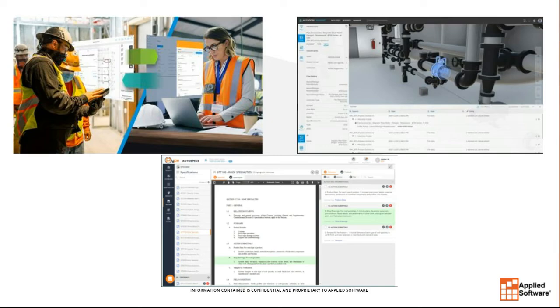And then at handover, a lot of times you get a big flash drive, or it used to be CDs. I mean, even when I was in the field, it was literally binders of paper that got stored in the security room in the basement. And until something broke, no one even knew where they were. And now what this allows us to do in Tandem is get all of that digital deliverable in one location, have all the documentation associated with it, all the submittal packages, warranty information, anything you might think of associated with a particular part in a building can be found in Tandem.